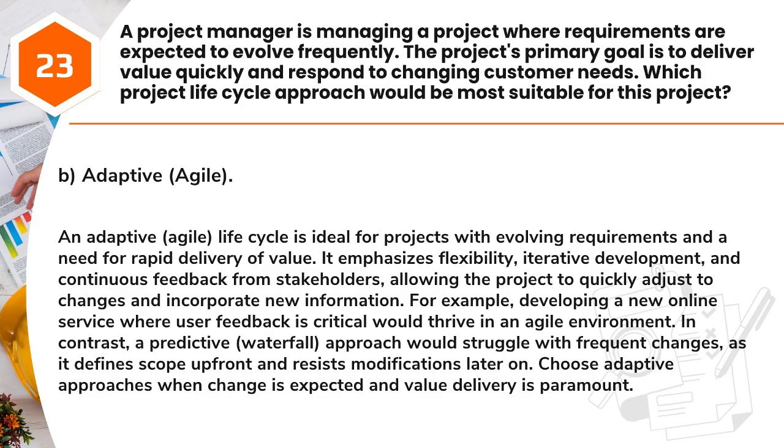For example, developing a new online service where user feedback is critical would thrive in an agile environment. In contrast, a predictive, waterfall approach would struggle with frequent changes, as it defines scope up front and resists modifications later on. Choose adaptive approaches when change is expected and value delivery is paramount.